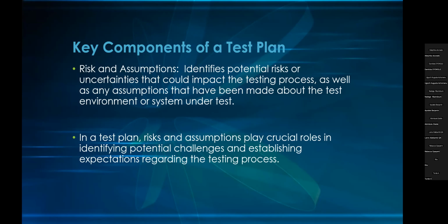Everyone is putting in their input. So all these things need to come. Every assumption made needs to be recorded, along with the rationale and any associated risks.